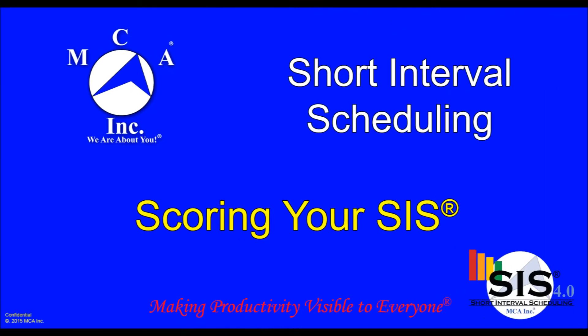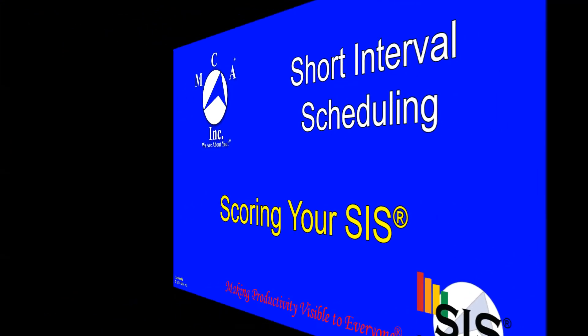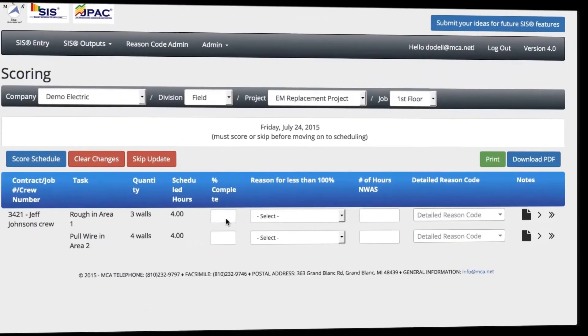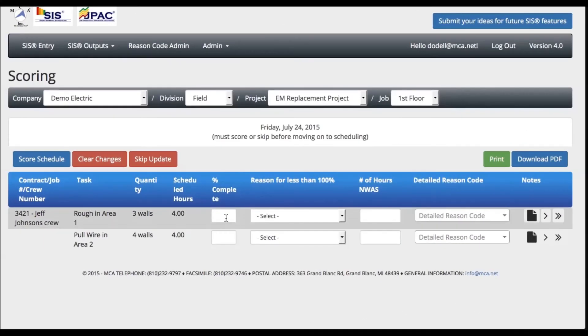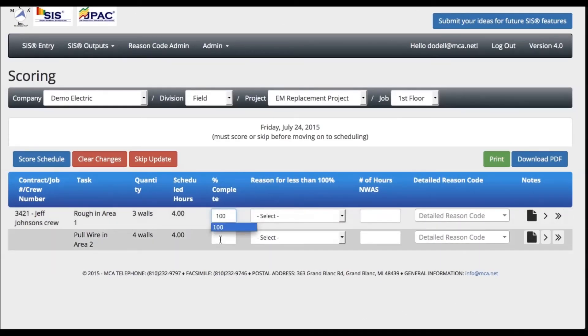Once your shift has ended, SIS will allow you to score your submitted schedule. Enter the percent completion for every task that was scheduled.